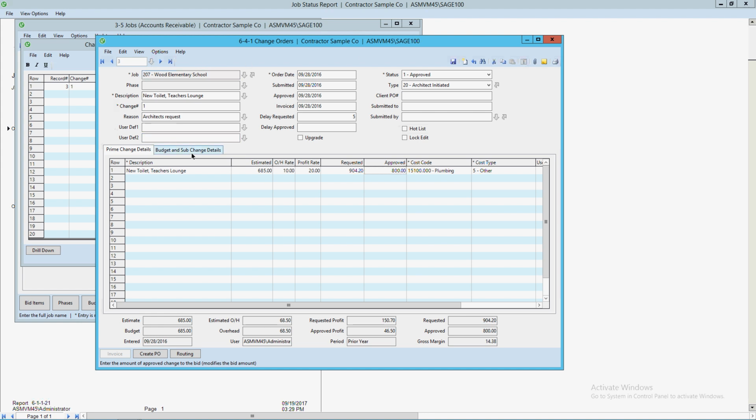Not only is that all in there, but we've got the budget and subcontractor amount, so we know there's our $585 for the Watkins Plumbing. Let's double click on it. It won't take me down into there, but it actually gives you all of that information, and we can look at it in the other screen. You'll see we've got another $100 worth of demolition on that particular job as well. So it's tracking all of the information that you need about the change orders, whether it's been approved or not approved, who approved it, and the dates on all of the approvals. All of that is there.